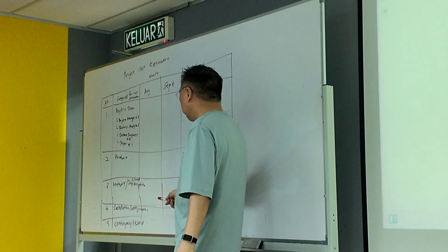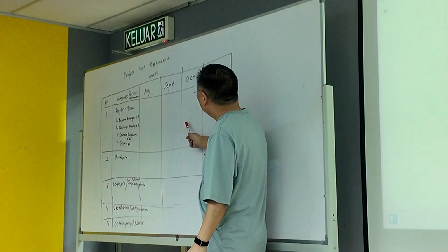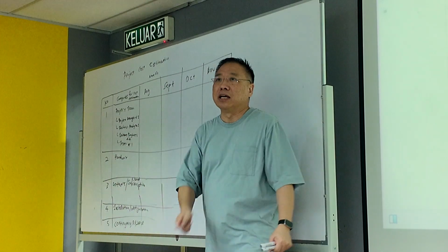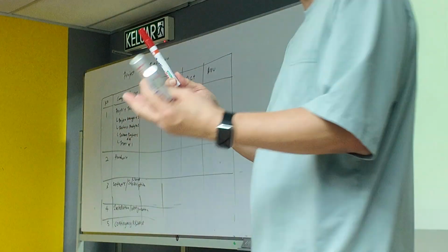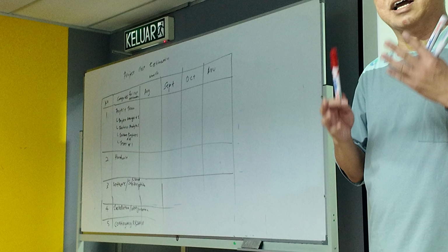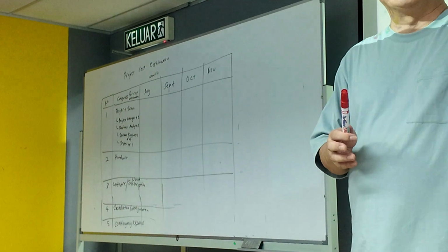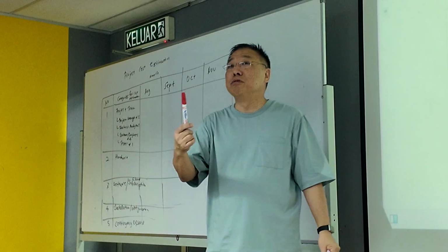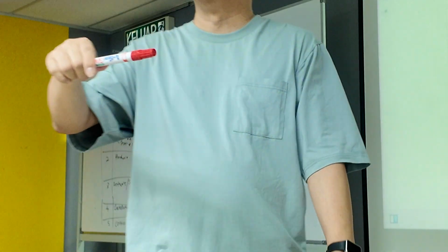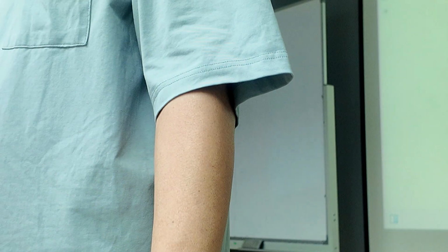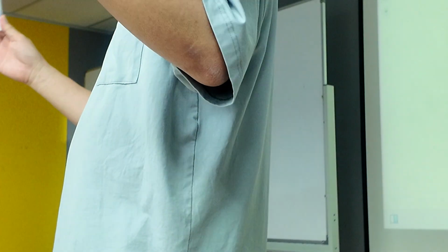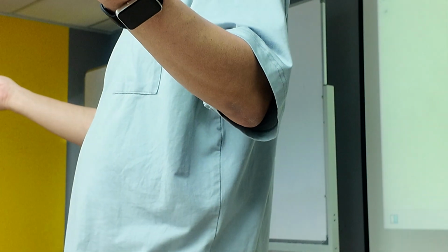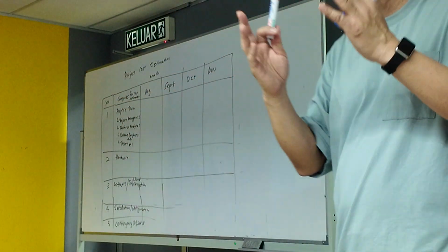So you put in the contingency just in case you come to the month of October, then you realize, I don't have enough time to finish all my modules because some of the modules are a bit more complicated than I thought. Let me bring in an extra software engineer. So the contingency reserve can be used to pay for the additional software engineer you might need because of an emergency. But if your project is properly planned, properly run, you don't need to use your contingency. But you need it in place just in case something goes wrong.